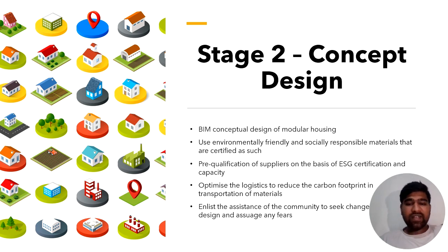Logistics planning also happens at this stage to reduce carbon emissions from transportation. One key feature is engaging the local community again to review the design and address any concerns. The decision gateway follows, focusing on community approval and an early carbon footprint assessment.